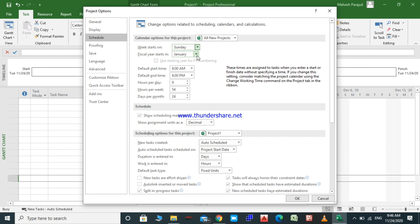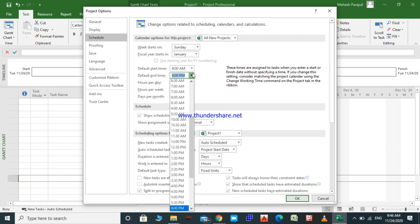We should make sure that January is selected here. Now we will set the default daily working hours. As I said, in this project our daily working hours will be 9 hours. Work starts at 8 a.m. and ends at 6 p.m.